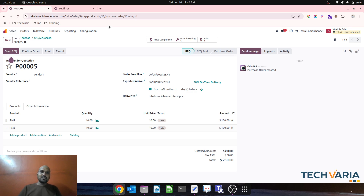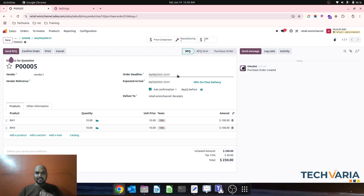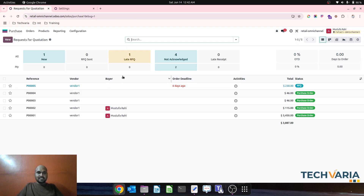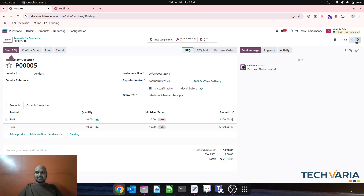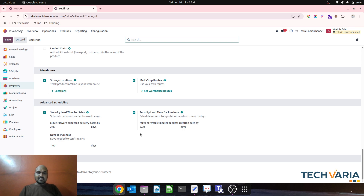I need to procure this material three days earlier plus one additional day — so the material must be procured well in advance, which is why the order deadline shifts earlier. Comparing: my previous purchase order showed confirmation date of the 14th, but the new one shows the 8th — that's how the purchase security lead time works.